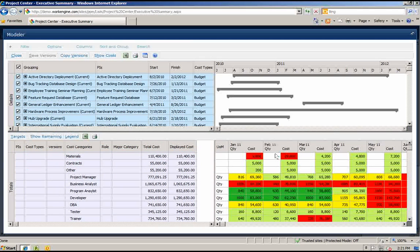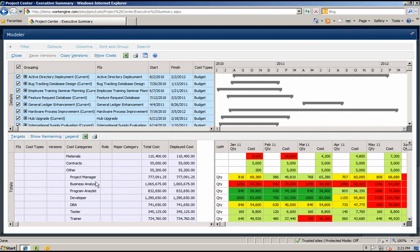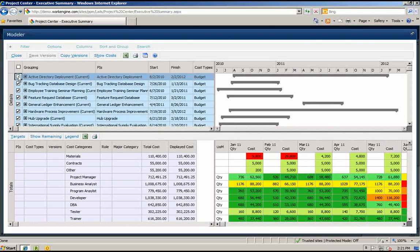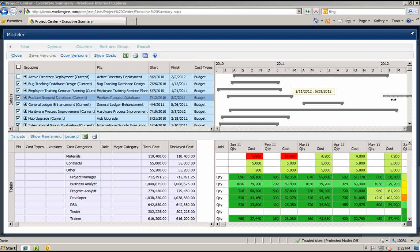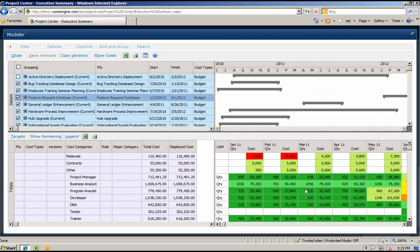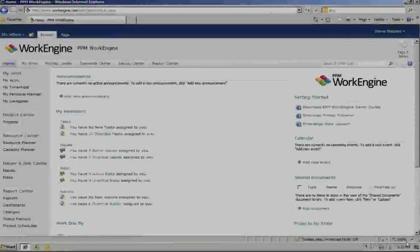By applying the FY11 target, you can now see where your costs are over and under by category and by period. Now you can proceed with some what-if modeling. For example, what if you cancelled the Active Directory project? You can already see that you are closer to meeting your budget expectations. Now let's move the feature request database out to 2012 — again, you can see that you are getting even closer to meeting your FY11 target.